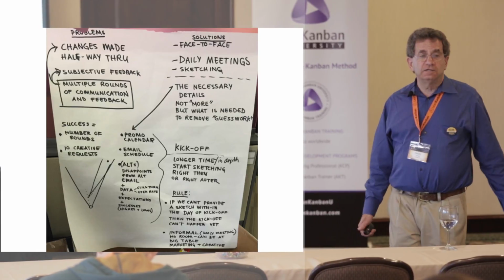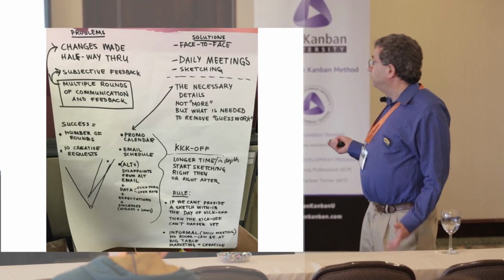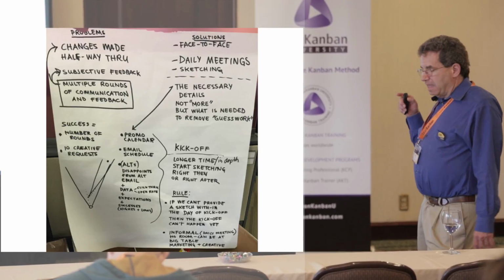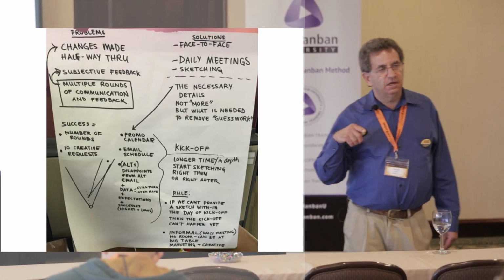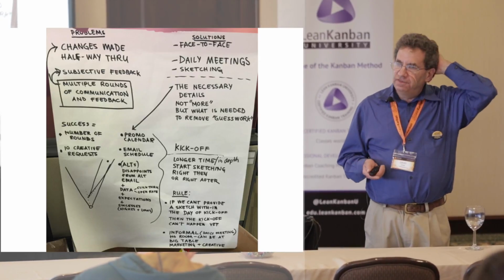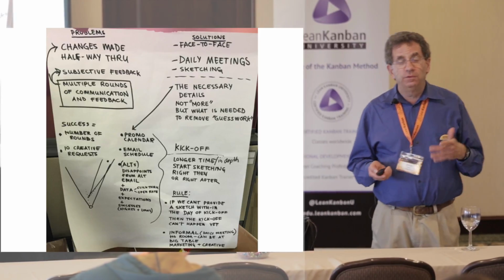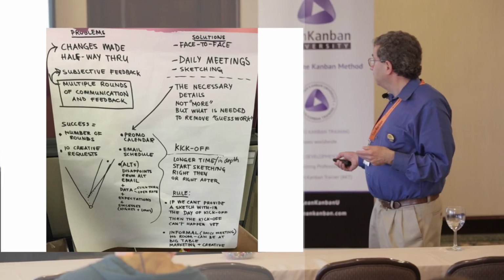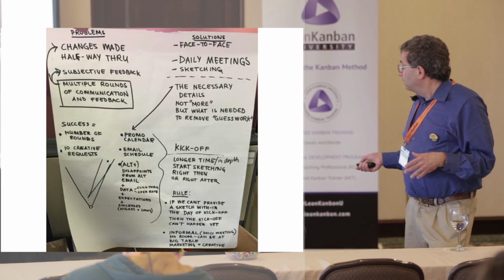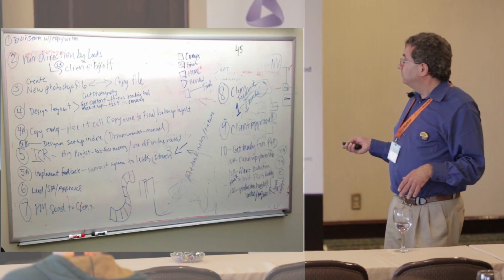Next thing we did was make our policies explicit. So the team decided that as soon as they pick up a new ticket, they would typically have a kickoff meeting. If it was small, easy, clear, they wouldn't bother. But if they needed a kickoff meeting, they wanted to make sure it was well understood what it would take to make that kickoff meeting effective. So they would do some sketches during the day and then have an informal meeting.